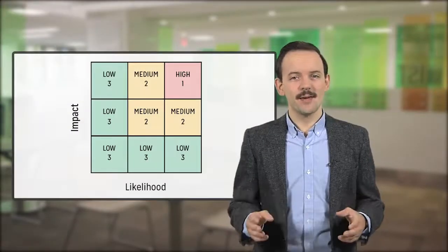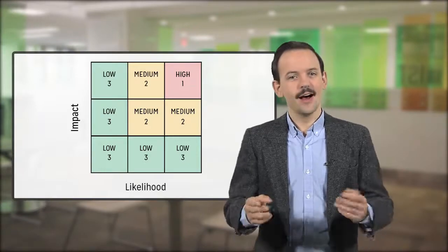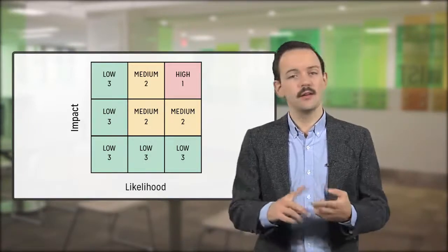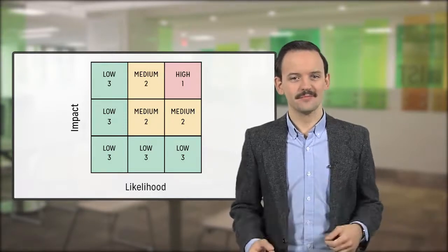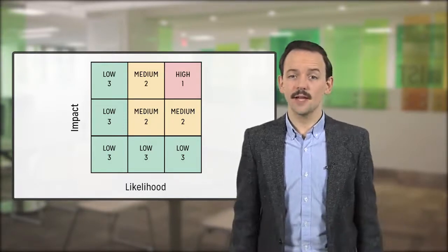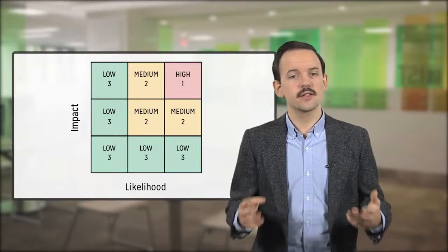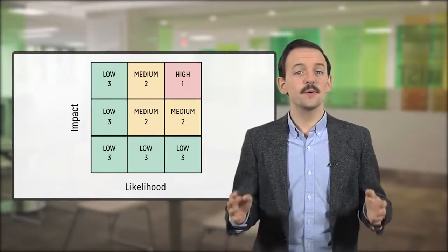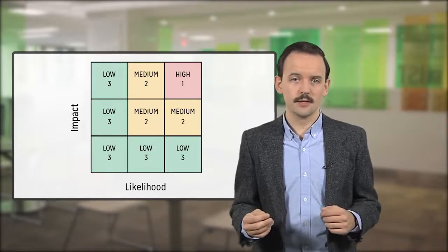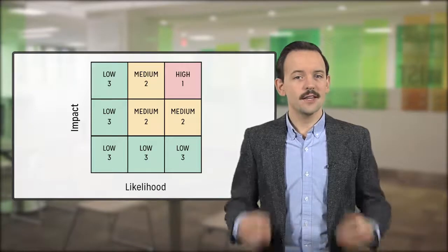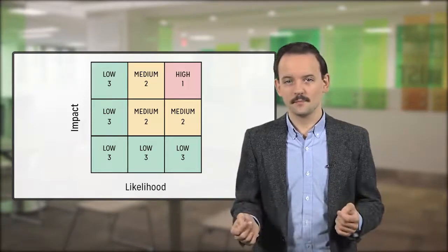When I talked about the impact versus likelihood matrix, I identified 3 risk categories, simply called 1, 2, and 3. If you recall, risks placed in the 1 category are considered risks that should be addressed as soon as possible. They represent the most danger to your project. These risks are placed in your project's plan, and the associated action is usually immediate.